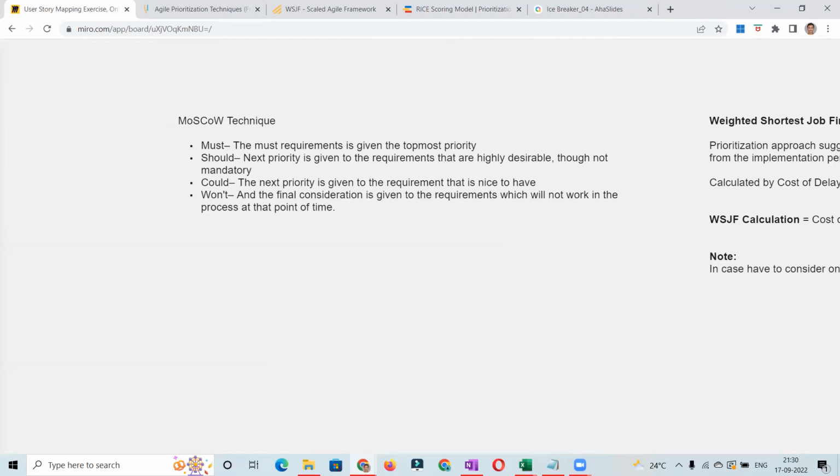Sometimes it does happen. Then you agree with your Scrum Masters and PO that you will do this story in 2 sprints or 3 sprints. But again, do check with your technical team if there are some technical aspects which they can pick up first, and which will allow you to do the functional bits in 1 sprint. So as I mentioned, a team can develop the database at their end, right? And save time on the functional implementation when they introduce the fields in the UI.